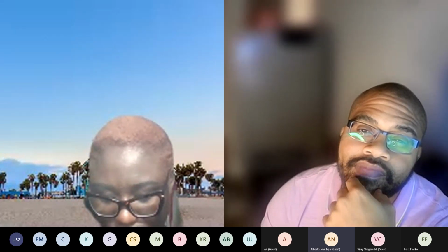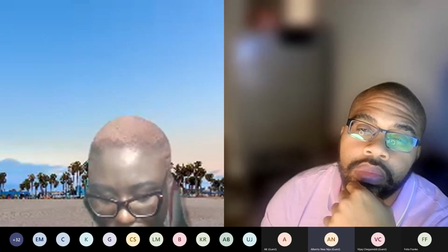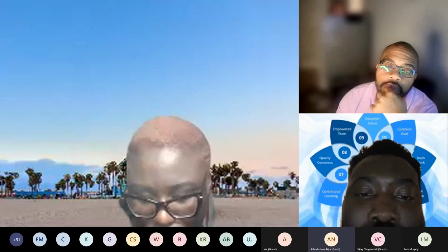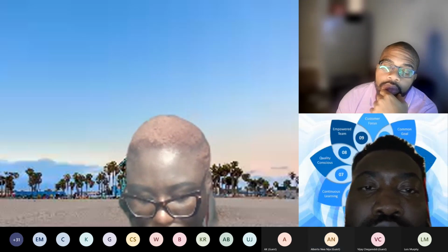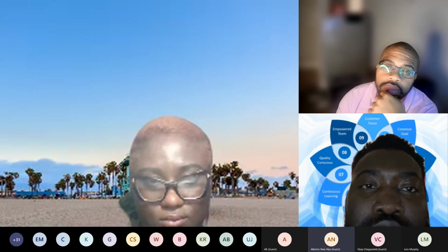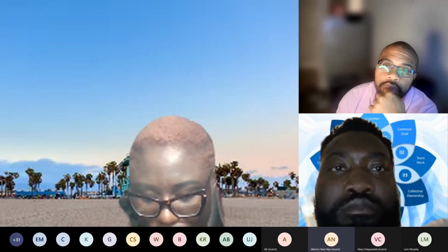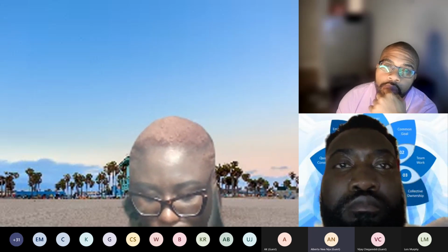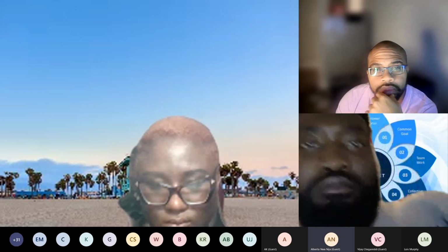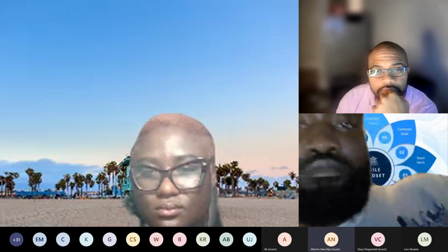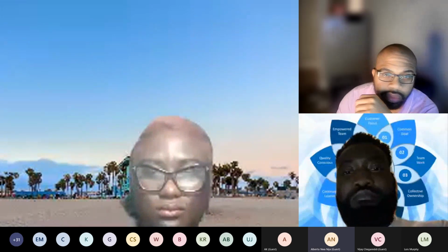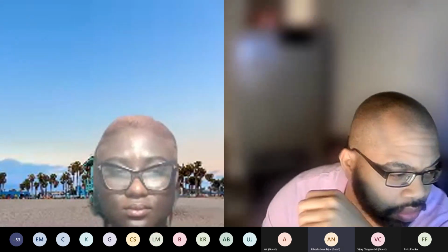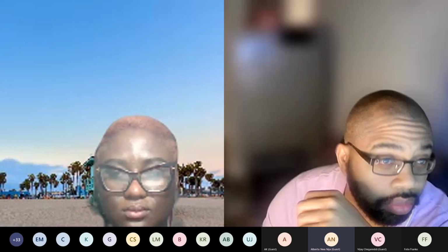Also, further to what I've shared earlier, we have an impediment board, so to speak, which is communicated to the stakeholders just to make it very, very visible, to say, okay, this is where we have challenges, and this is the kind of support that is required from leadership to remove those impediments.